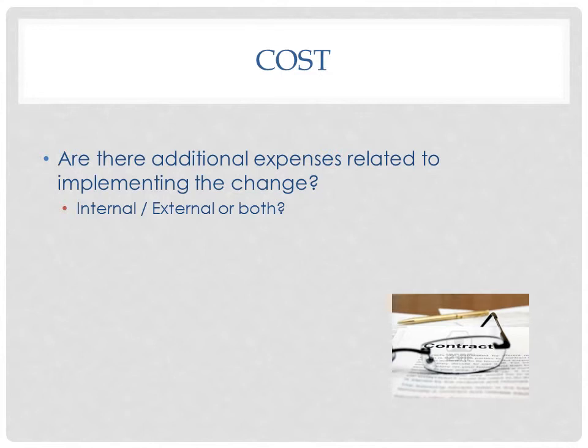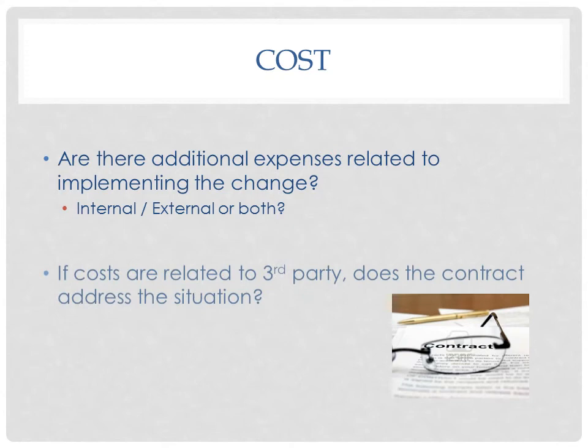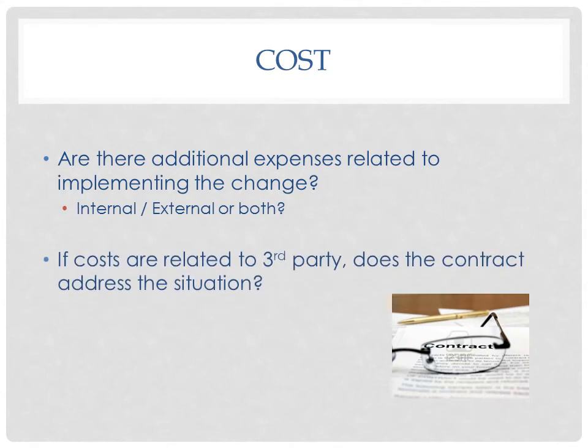Any impact to the project budget should be detailed and include both internal as well as external expenses. For any expenses related to a third party, be sure to check the contract for things such as hourly rate and approval process.